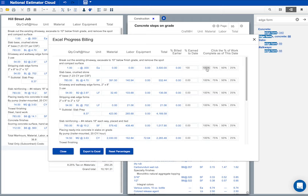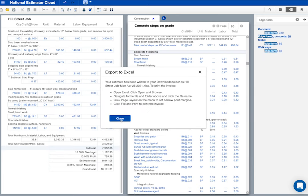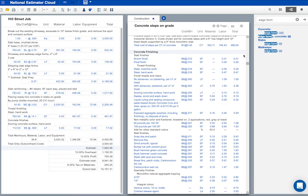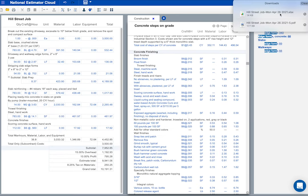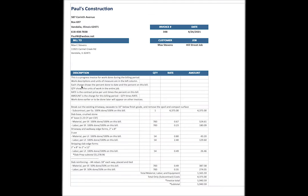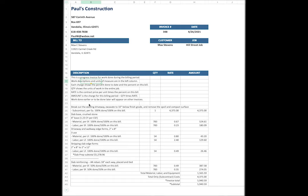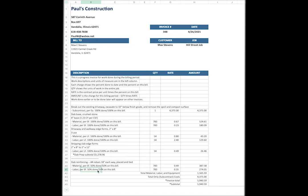Our invoice will cover work done that week. If demolition and excavation are 100% done, I'll click 100%. Slab base will be 100% done. Edge forms will be 100% done. Placing rebar should be about 50% done. Let's have a look at the invoice. These lines explain to our customer what's on the invoice and how the charges were figured. Charges are spelled out for each part of the job.